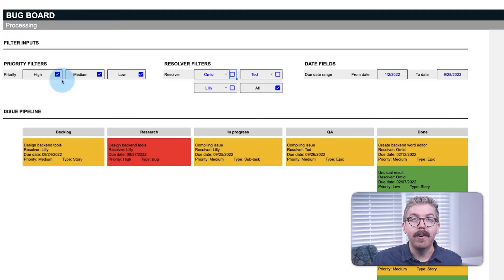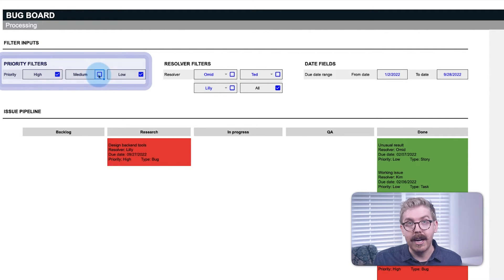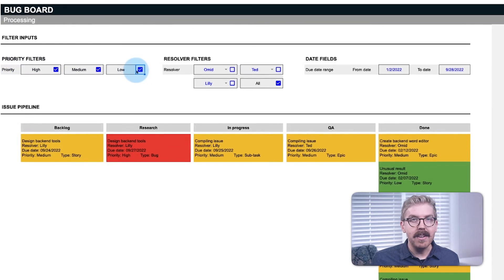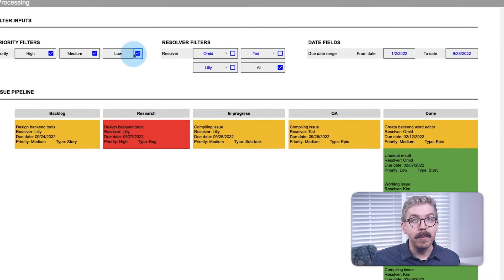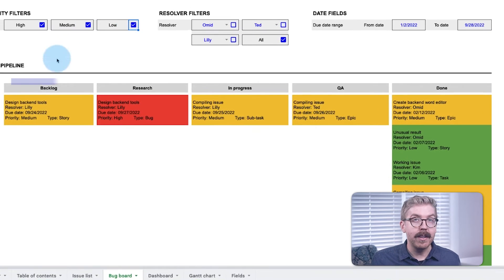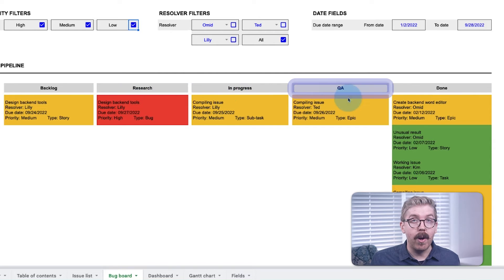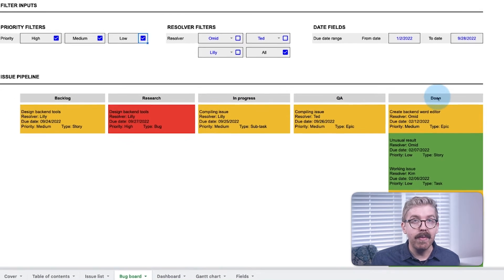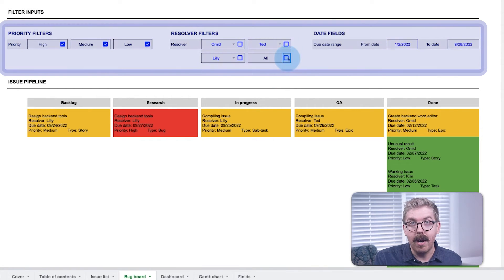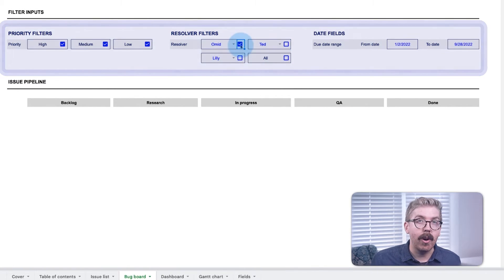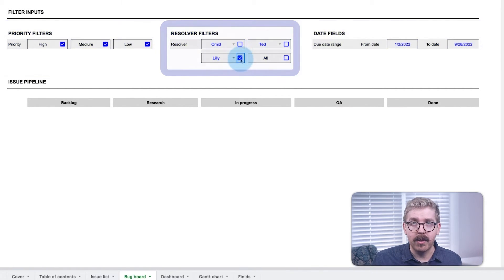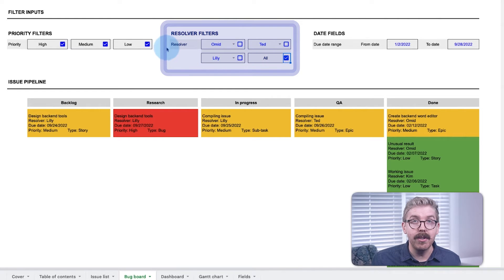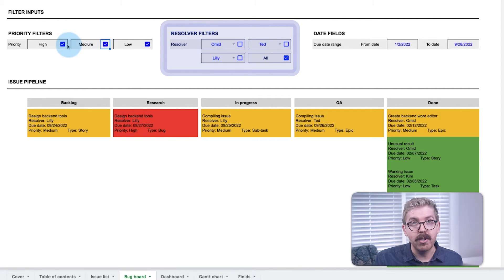Following Kanban style, they are color-coded to signify their priority level. In Agile, the simplest workflow format is to have a backlog stage, an in-progress stage, a code review or quality assurance stage, and then a complete stage. You should also provide some filters like we did at the top, especially if you are a manager or working with multiple team members so individuals can filter for their most important metrics.